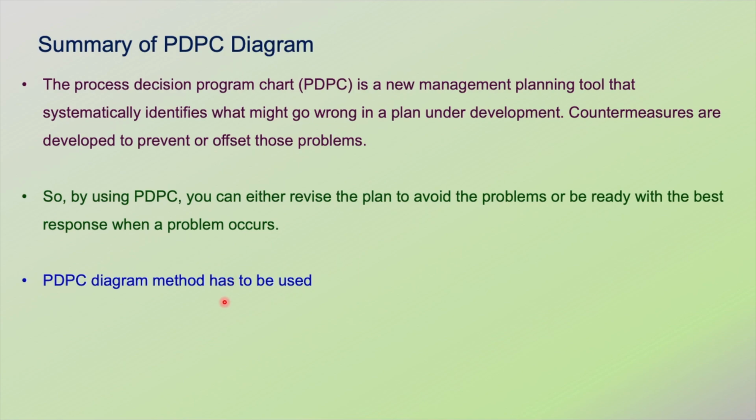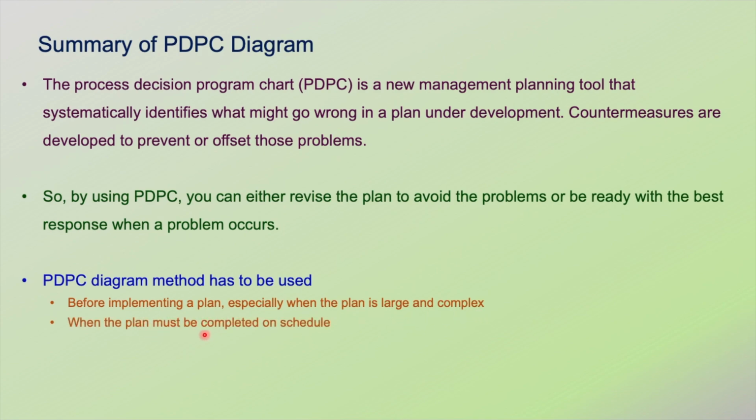PDPC diagram method has to be used before implementing a plan, especially when the plan is large and complex, when the plan must be completed on schedule, when the price of failure is very, very high. So these are all the situations when you essentially have to use PDPC diagram.